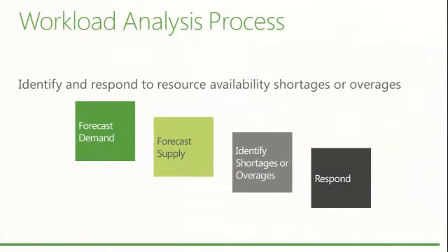Okay, so here's the basic process that we would walk through if we were doing this. Now the first two boxes there, forecast demand and forecast supply, those are really interchangeable. It doesn't really matter which of those you do first. But basically, you're looking at, okay, what is our demand? Of all the projects that we're trying to take on, what demand is that going to place on the resources that we have? Or even resources that we don't have? How much work is it going to take to get all this stuff done that we'd like to do?